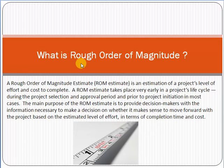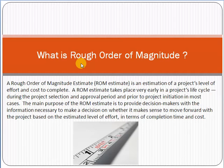Senior management and decision makers use ROM to decide whether to move forward with a project or not. For example, if you are starting an e-commerce solution project, at the time of contract signing you may involve domain experts who can give an idea — say, five months and ten thousand dollars. This is a rough estimate, not a guarantee. The domain experts provide this idea based on their knowledge and experience.